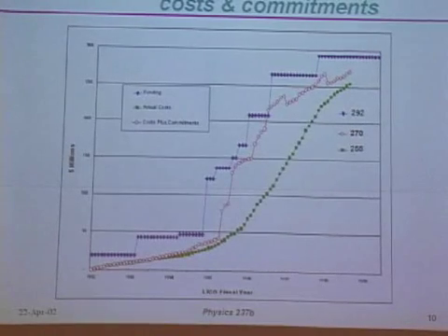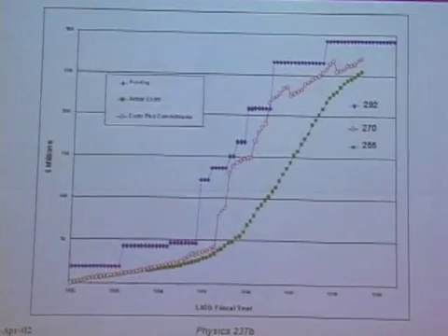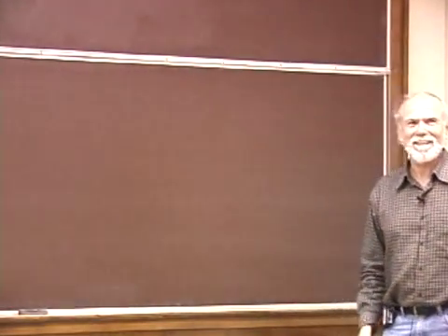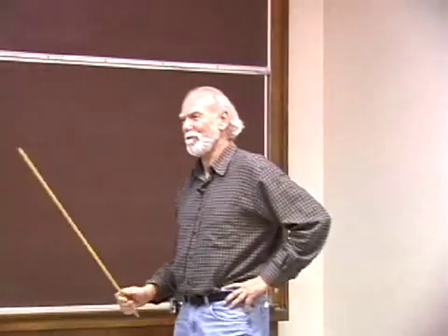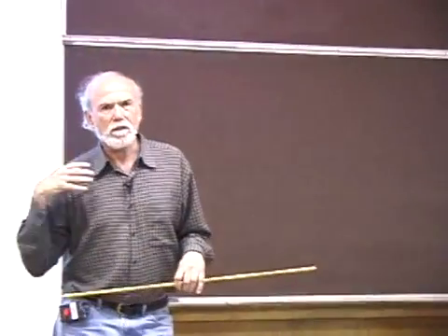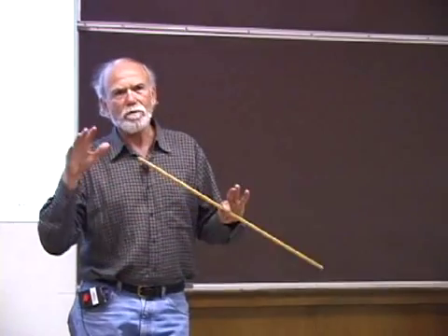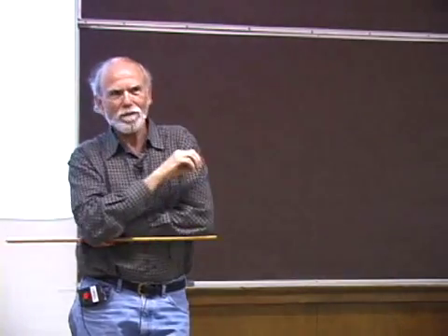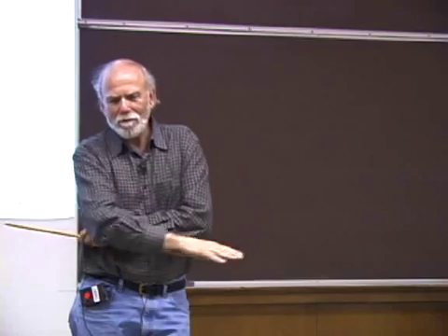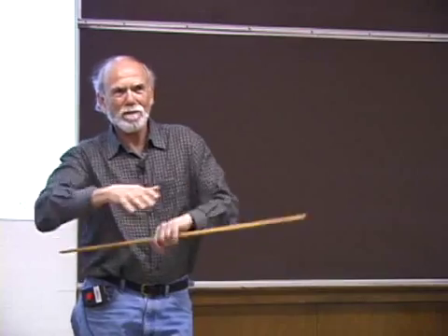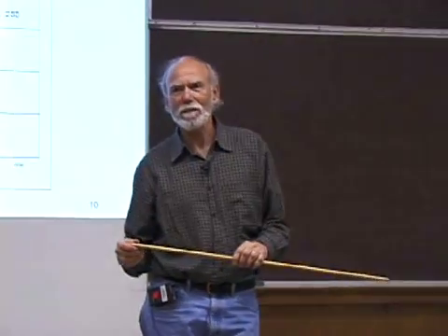How do you do that? If you do something at home and build something, you just kind of guess at it and you add something and build it. And here the stakes are a little bit higher, so you have to try a different discipline. What we did, and this is not just us, but the scheme sometimes differs, is the scheme I'll give you, the one that we use. We create this vertical thing with all these boxes, and then we go down to absolutely the lowest level possible, to whatever widgets or pieces you need to put together, as defined as they are, and some of them are better defined than others.